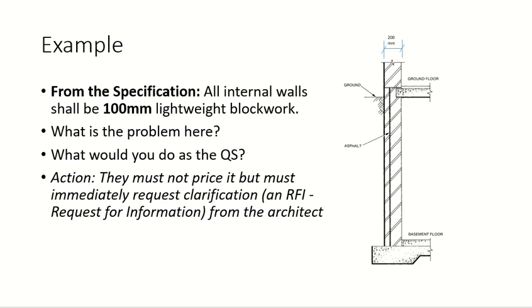If you are the quantity surveyor, you cannot assume. I did not design this wall. I am not the architect. I am not the design engineer. So what would I do? I will go back to the person who designed this. So 100 could be correct, 200 could be correct. I am not sure. So assumption is not an option here. You go with this one or that one.